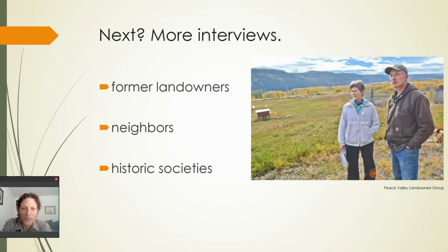It's not just the immediate landowners, of course, that you want to account for, but former landowners. So maybe you can track down an old timer who used to own the property, and they might know something as well. Talk to neighbors, talk to historic societies, really just spread your net wide as far as interviewing folks to understand the history of a property. That might reveal things that are threats that you weren't otherwise aware of. For example, buried underground hazardous material tanks. You don't want to find those on accident. You want to know about those up front.